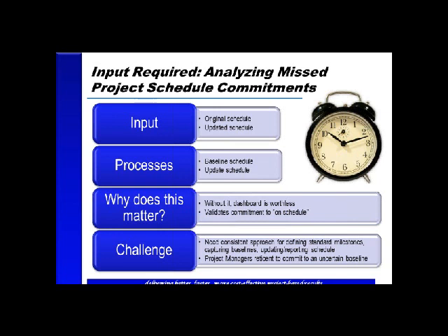Why is it a challenge? Well, capturing a baseline is in fact a project manager formally and sometimes voluntarily committing to accountability. As soon as we baseline a plan, we've got a snapshot we can measure the schedule against, which implies that as soon as something goes wrong, we have a variance, and when we start asking who we're going to point to, the answer is the project manager.